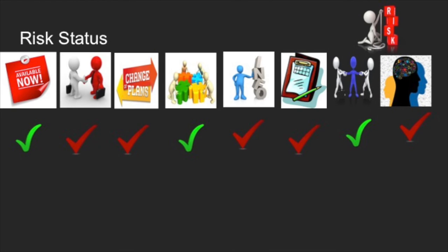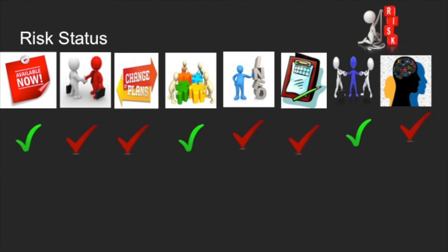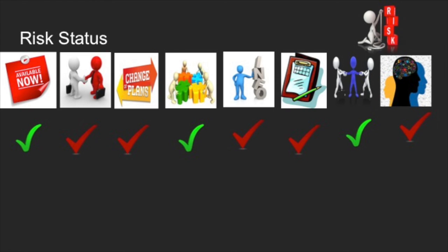Previously in our project, we had eight risks, three of which now have been checked. The three risks that have been checked are first, the availability risk or knowing that everyone will be available and have enough time for the project. Second, the resource management risk or the allocation of tasks that are not matched to the developer team. And the third risk that was checked is the client availability risk, where the client may possibly not be able to participate in the requirement analysis and give their response, which we also checked by having weekly meetings and assessing the situation early.